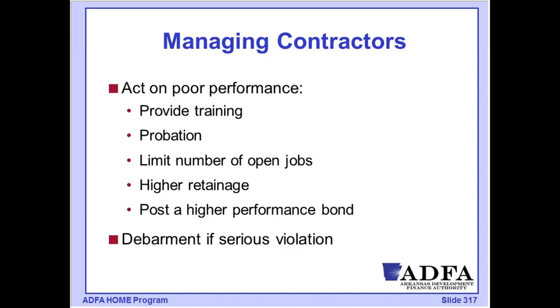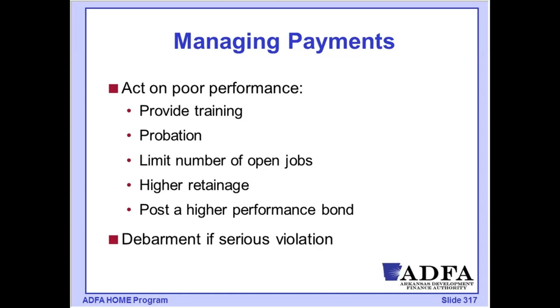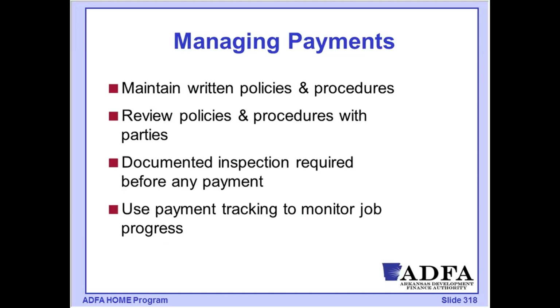So when we have contractors that have serious violations, they essentially can be blocked from any future federal contract. So we mentioned in the procurement section about using the SAM list to review before executing contracts, and that's where we are screening to make sure: are those folks actually on that debarred list? Are they eligible for any further federal contracts?